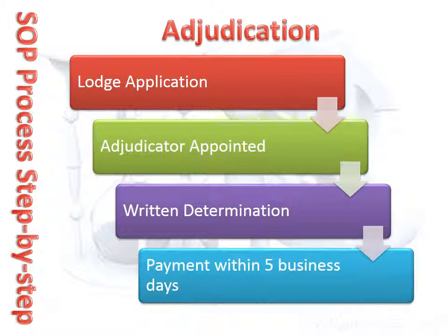If the adjudicator finds an amount to be due and payable, the amount, together with the adjudication fees, if awarded against the client, must be paid within 5 business days.